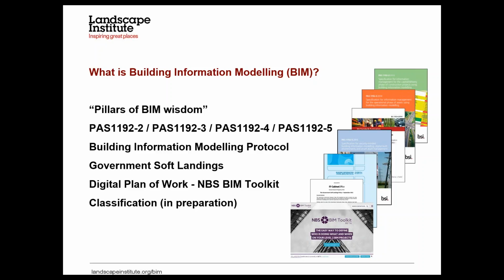Government Soft Landings talks really about engaging the facilities managers earlier in the process. So the facilities manager has an input into the design because they're the ones going to manage the facility after it's been handed over, but also having a soft handover. They call it soft landing. So you don't just do it at the end of the day, right, you know, Mr.